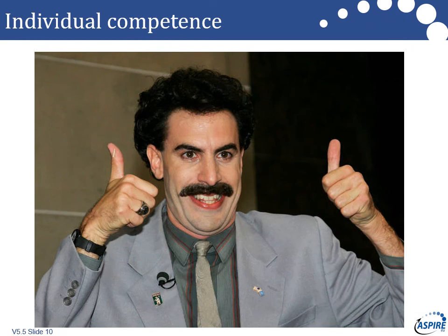So when we're building these competency models, it's very easy for us to draw these reporting lines, put a plethora of committees in place, and then we can go to MSP or Prince2 or APM and get a whole load of responsibilities, allocate them to the committees or the boards, and away we go. We've done our job. But what we have found is that it's much more helpful to allocate these jobs to individual roles. Committees and boards are ways of dispersing your responsibility. So to keep that line of sight, it needs to be really clear what each member of that board is responsible for. So we do that and we give them tasks and we do all that.